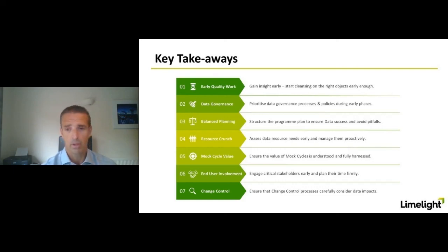So what you need to be able to do, apart from have some nice engaging dashboarding, I think we showed little snapshots of some of our dashboards that we've been improving and working on because we think it's such an important factor. Apart from having the excellent dashboarding, you need to be able to distill it down into, okay, if you don't enrich or cleanse that data, what it means is the extract bit of the extract transform load cannot be tested. We're literally going to push that down the road to the next mock and take all of that risk that when we try to extract the data, we hit a problem. And it's pulling it down into that "so what" that's really important for people.